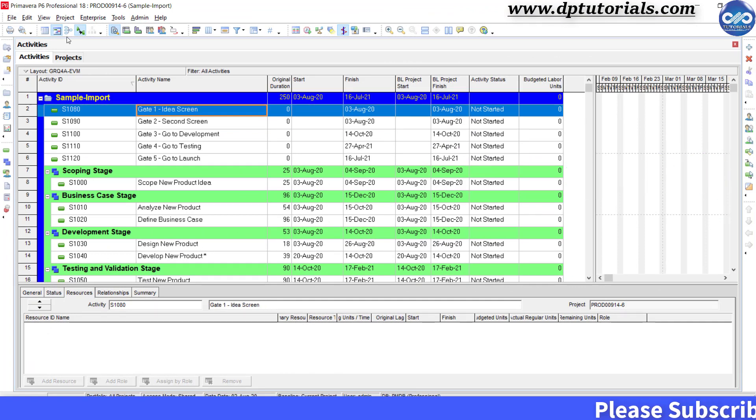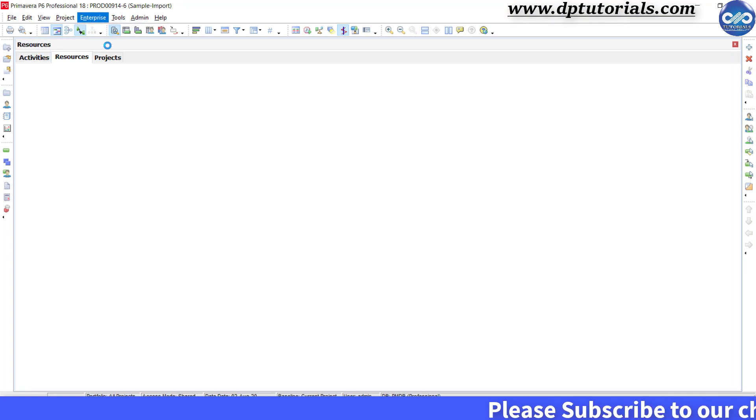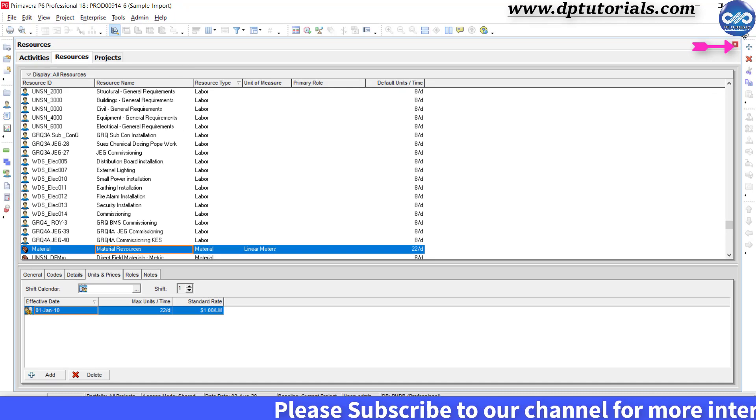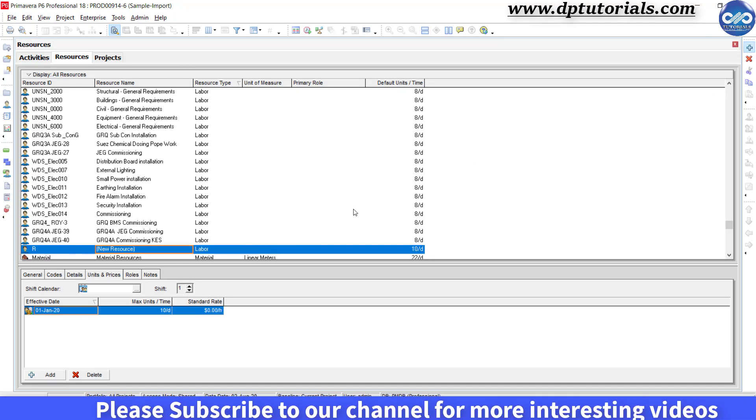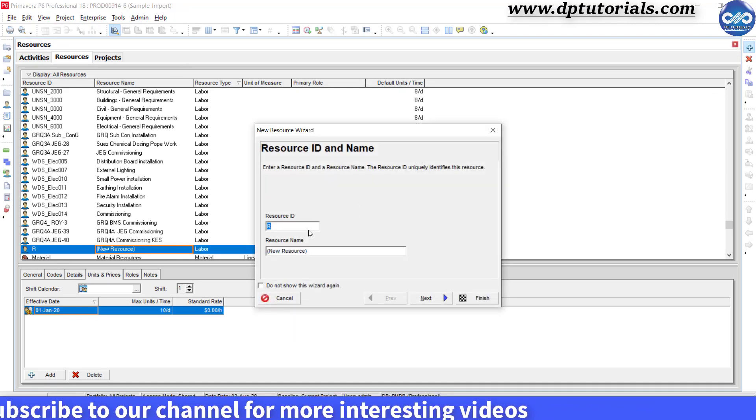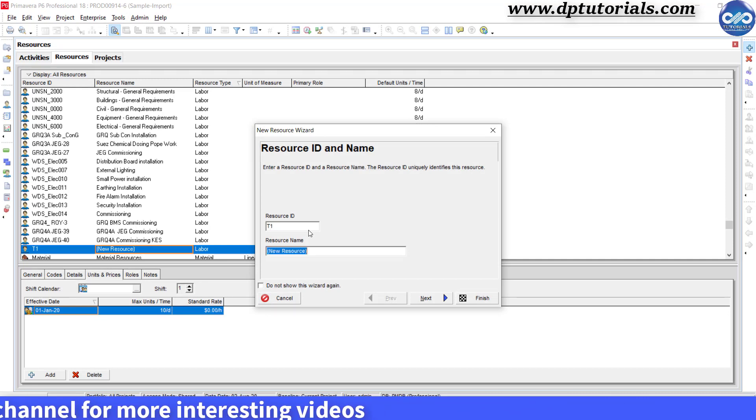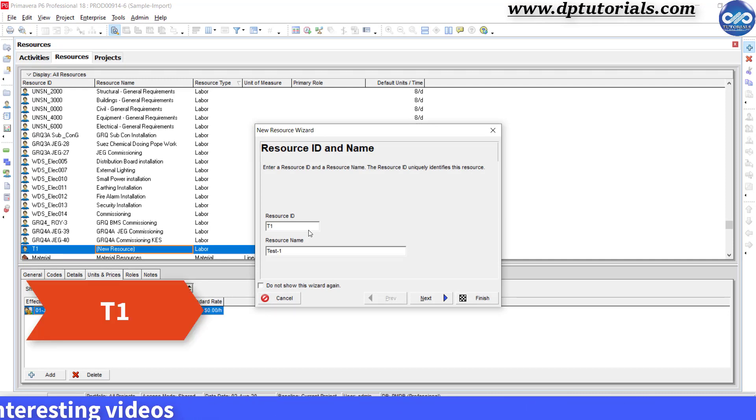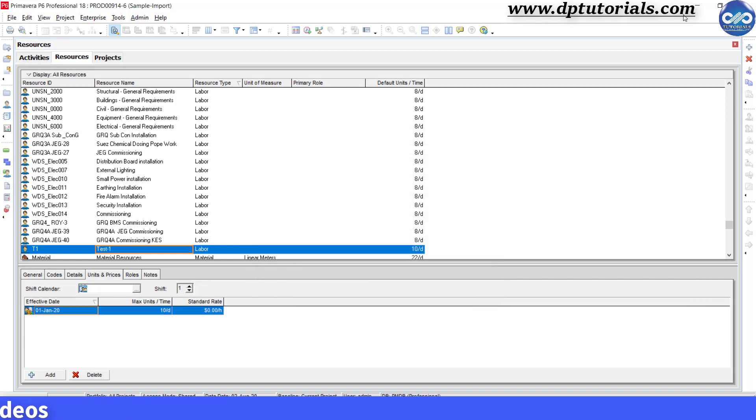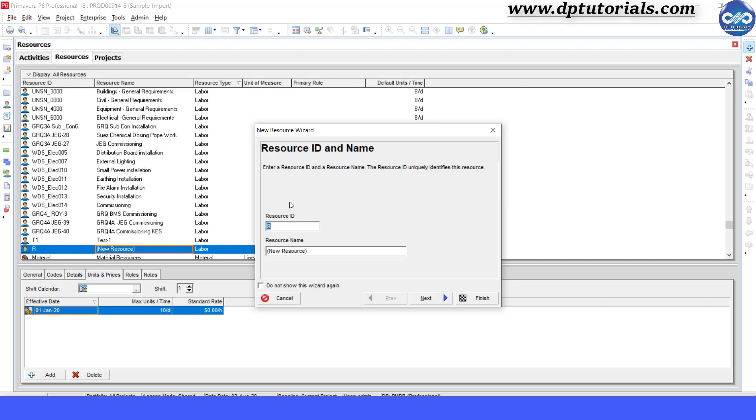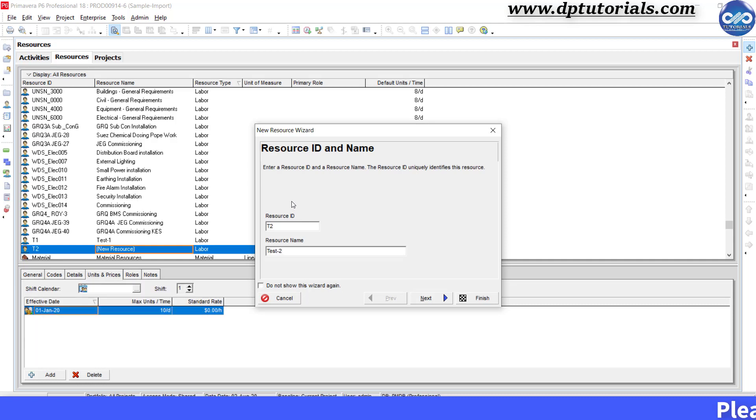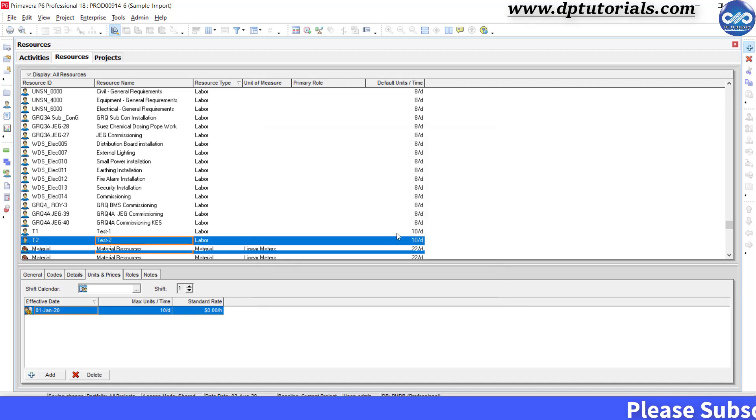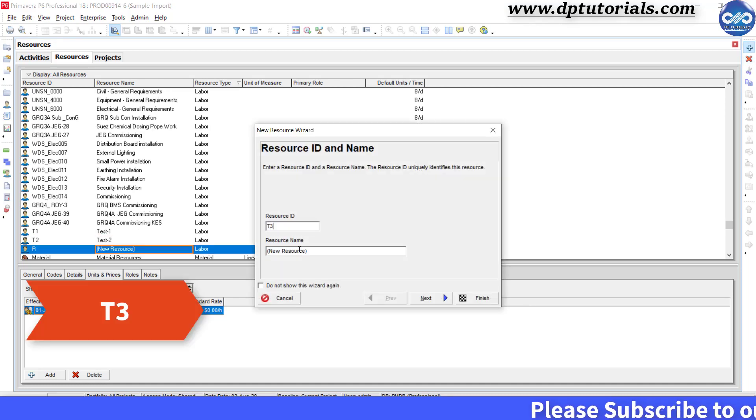Go to Enterprise, click on Resources and in this window, click this plus button and add resource with id as t1 and name as test1. Now, click Direct Finish. Similarly, add resources as t2, test2, finish and t3, test3.